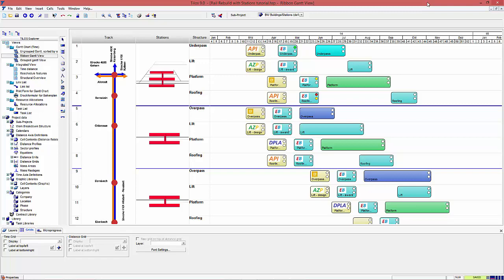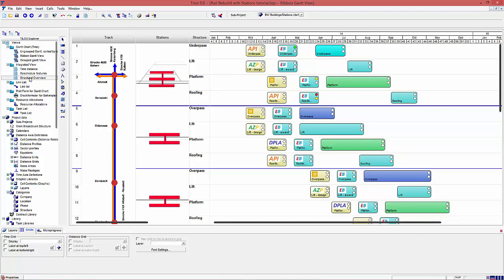What else can be done with category or WBS structure? We have created 2 new task types, the WBS summary and the category summary. Both task types can be used to sum up all tasks on a specific level and below in just one task, the WBS or category summary. That can be used to display a schedule overview with low granularity. This is the detailed schedule in time location diagram.